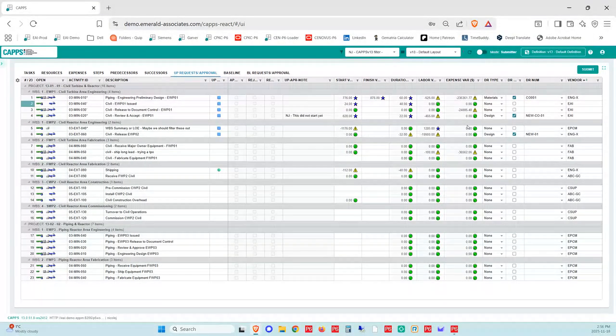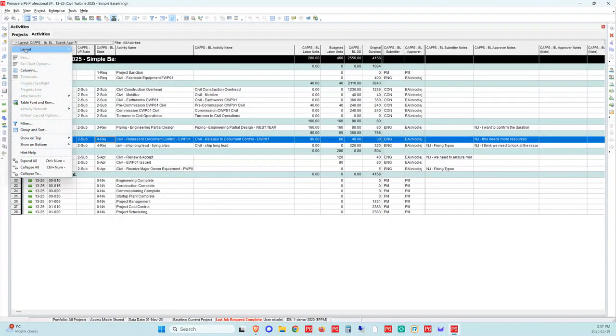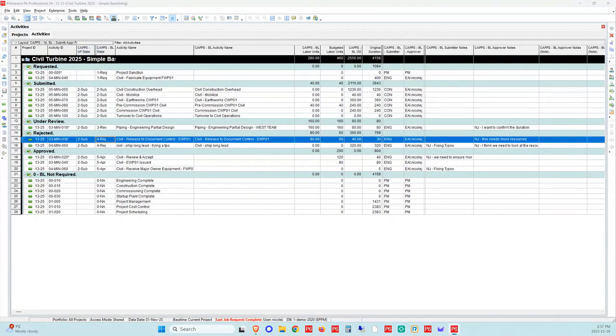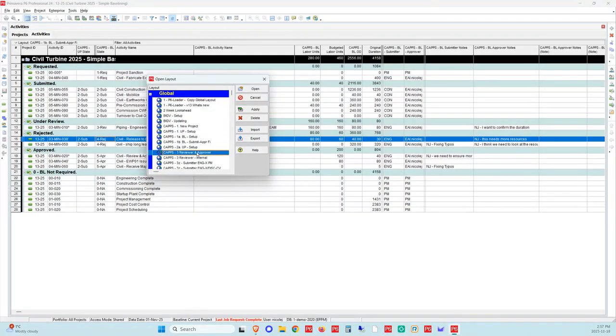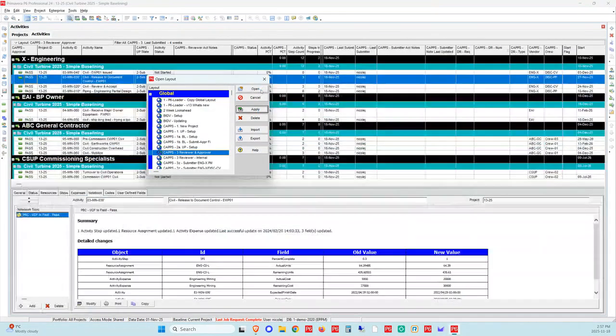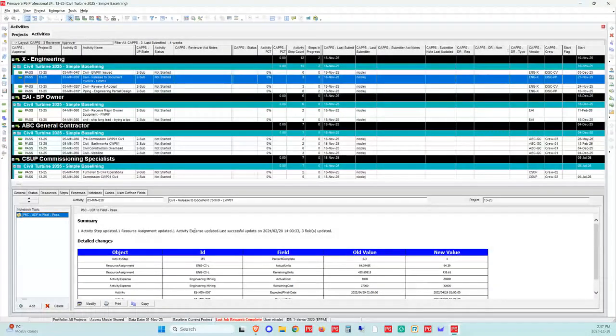Okay, now those values may not match 100% to what P6 calculates, because of course the duration is a guesstimate, right? Until you F9 and reschedule, which is in P6, your duration variance may not be exactly right, but it gives you an idea of what's going on as the approver inside of the system. So they would approve it, submit it, and same thing that we saw before, it goes into P6, and they can see what's going on with and review and approve it. So the final say is always inside of P6.